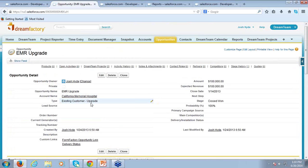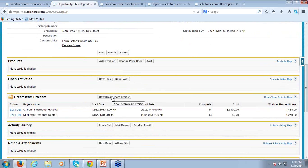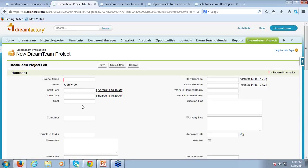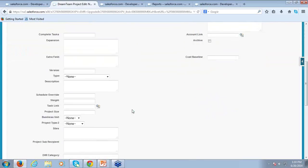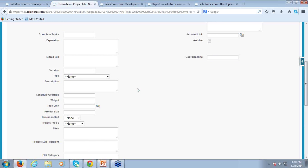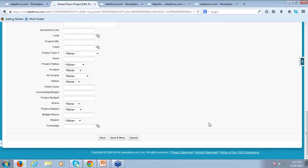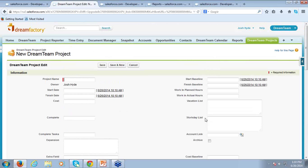You can go in and fill in basic information like the name, start date, and so on, and hit Save to create a whole new project template in DreamTeam. That whole process can be fully automated: once the trigger event happens — say the opportunity goes to Closed Won — it automatically creates the full project in DreamTeam. Through the use of workflows, we can also streamline notifications. If a task is running late, you can create a workflow to notify all team members on that task, leveraging Salesforce tools to automate and improve communication efficiency.